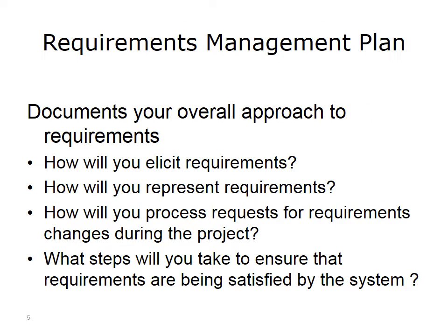The second document, the Requirements Management Plan, has a very different objective. This is a place for you to document your overall approach to requirements, so it will address questions such as, how will you capture requirements and represent them? What is your process for handling requirements changes? How will you ensure that the requirements are being satisfied by the system?